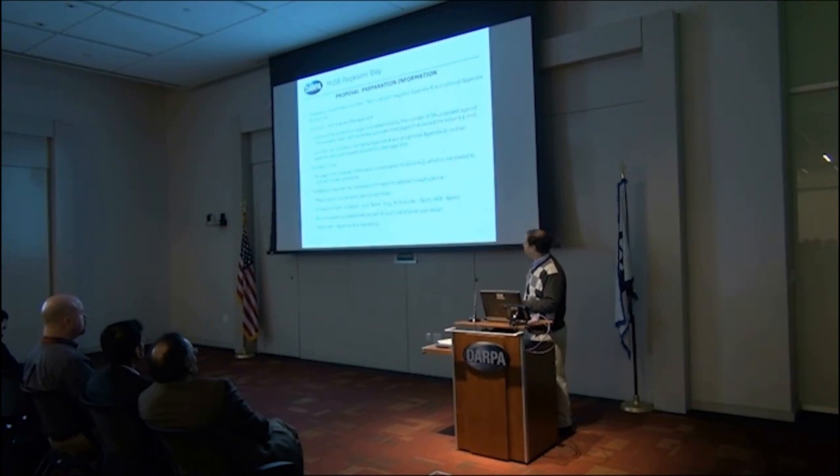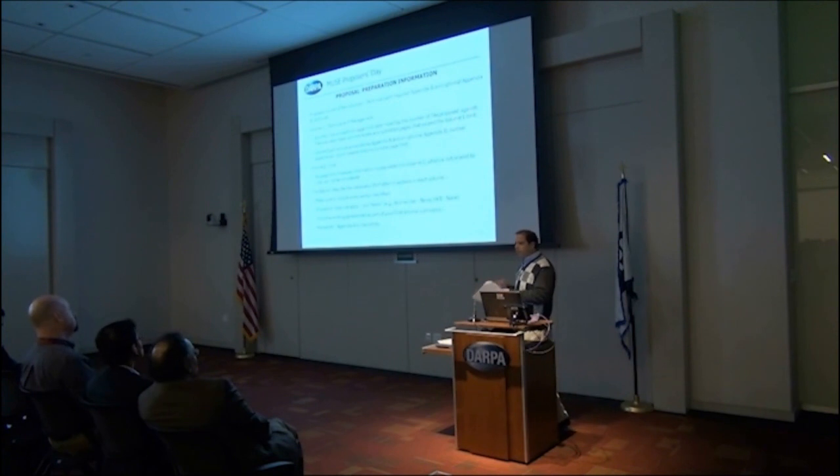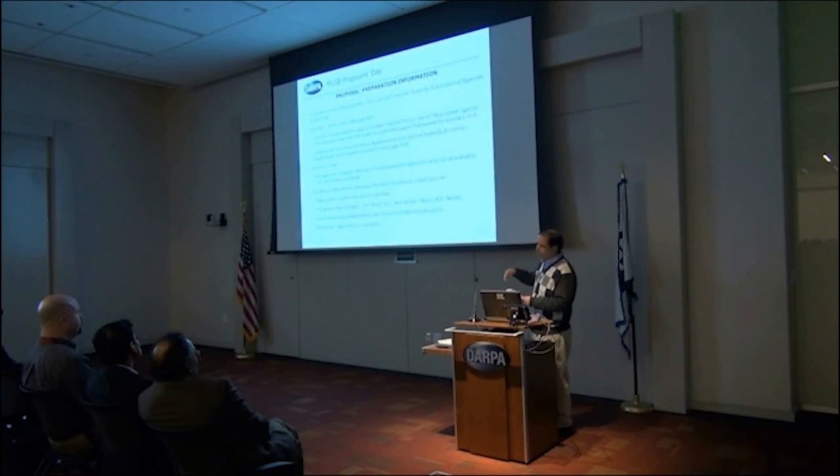Cost proposal volume, like I said, it's important to me. On the presentations that I normally give for MTO, I have like a good 4 slides just on the cost proposal. But an important point here is to make sure that you have a spreadsheet, a working spreadsheet, which means actual formulas in there so that we can actually see how cost proposals are built up. That's important. As we go through the technical volumes and the statements of work, we want to make sure that we understand the logic, and sometimes that logic can be discerned from just looking at the formulas in those spreadsheets. So a spreadsheet isn't a spreadsheet if you're just sort of PDFing it and locking us out from actually seeing how that thing is actually working in the background. So as a contracting officer, I can tell you that's really very important.